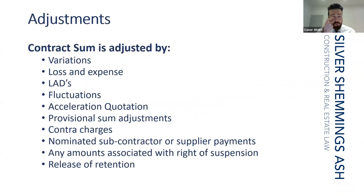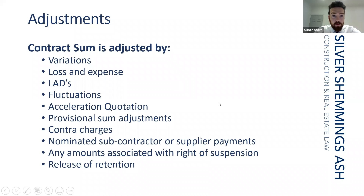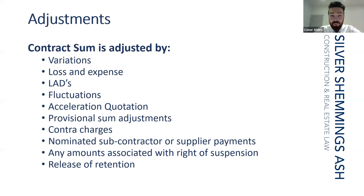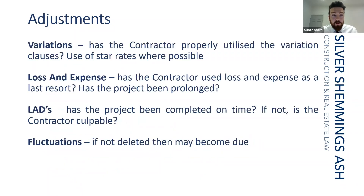The bulk of a final account is around adjustments — what adjustments do I need to make? Basically the contract sum is adjusted by: true variations, loss and expense, liquidated damages, fluctuations, acceleration quotations, provisional sum adjustments, contra charges, nominated subcontractor and supplier payments, amounts associated with the right of suspension, and the release of retention. There's quite a few adjustments there.